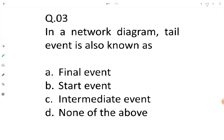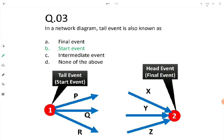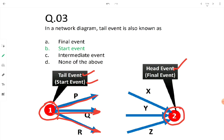Let's move to question number 3. In a network diagram, a tail event is known as: final event, start event, intermediate event, or none of the above. When we say an event is a tail event, look for an event which is giving rise to some activities. A tail event is also called the start event, from which activities are arising and starting. The opposite is the head event — head event is the final event toward which activities are progressing. Therefore, tail event is also known as a start event.